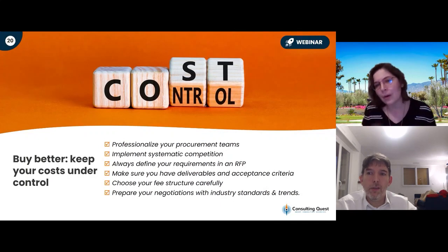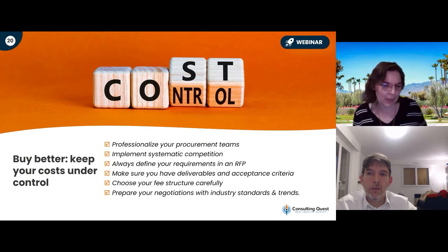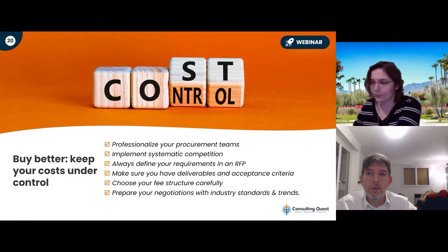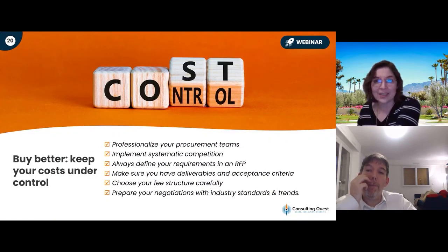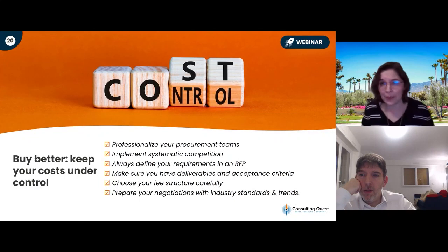But there's another case where one of our clients had put in place a performance-based bonus, but at no point did they decide on the criteria, on the metrics, and at no point did they evaluate the results. So they were in a situation where the consultants had no way to assess how good they did.